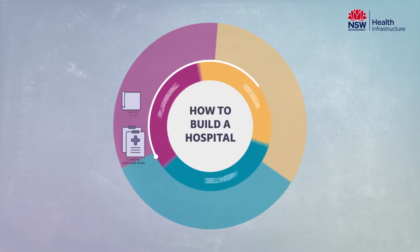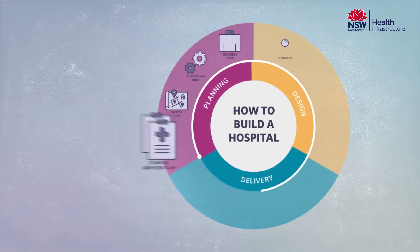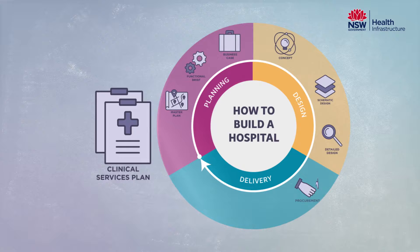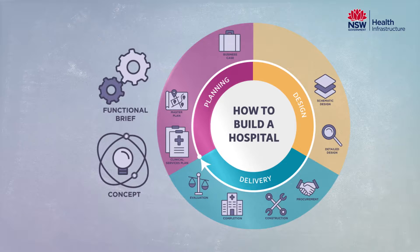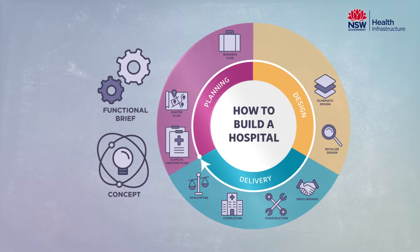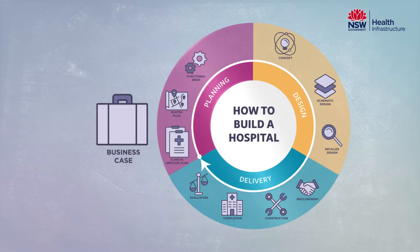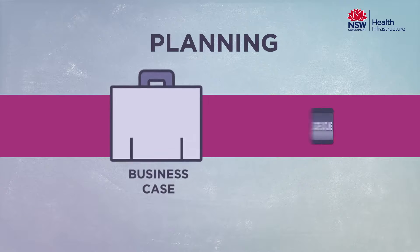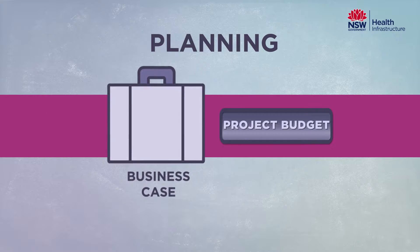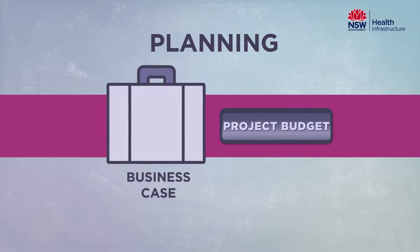We combine information gathered from the Clinical Services Plan, Master Planning and the Concept Design to develop a business case. The business case outlines our scope for the project and determines our budget for the redevelopment.